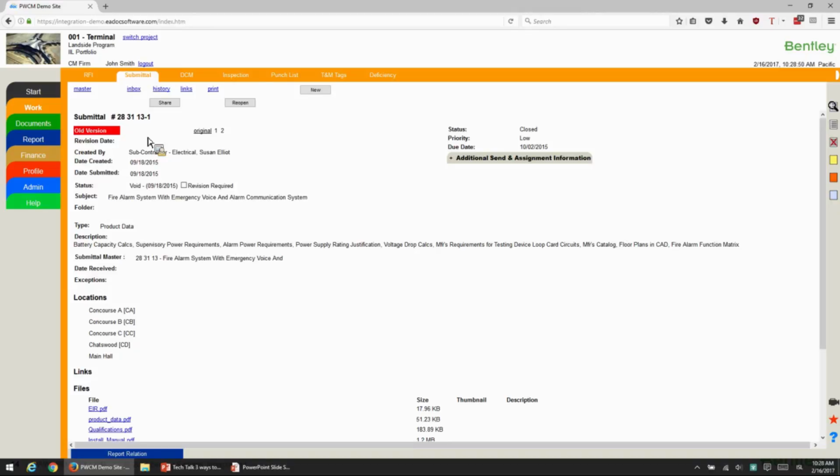Okay. Thank you. Next question is about risk tracking. How can you control who sees risk items? So a risk item, when it's created, it is only visible to the organization that creates it. So if I'm the construction management firm, or within that firm, then I will see that risk, but nobody outside my organization is going to see it.